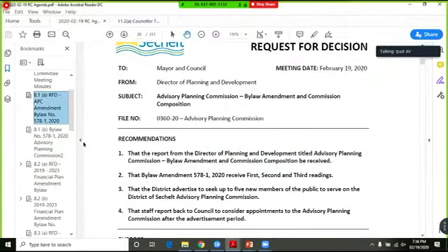This is the financial implication. The total project cost is $685,074. The eligible grant is 70%, that is $479,551. The district contribution from gas tax is 30%, that is $205,523, and the application deadline is February 20th.